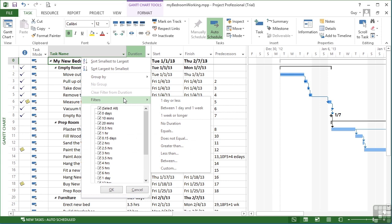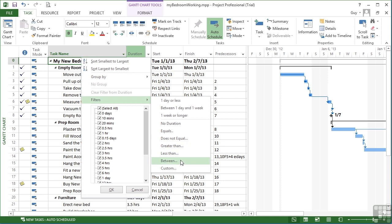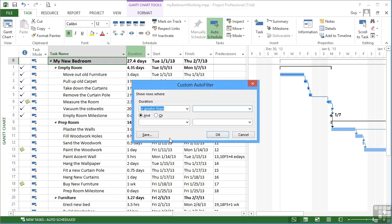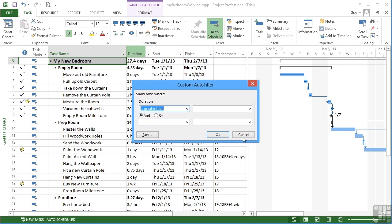In the little pop out, the pre-built section, you'll see because we're on the duration column we have an option for anything that is a day or less or between a day and a week or a week or longer or has no duration or uses one of the comparison options equals, does not equal, greater than, less than or between. Each one of these will actually take you to the same dialog box but have pre-populated this option. I chose is greater than and it pre-populates is greater than but the others are listed so I could change my mind.